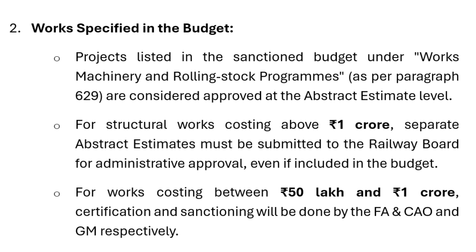For structural works costing above 1 crore rupees, separate abstract estimates must be submitted to the Railway Board for administrative approval, even if included in the budget. For works costing between 50 lakh rupees and 1 crore rupees, certification and sanctioning will be done by the FAR and CAO and GM respectively.